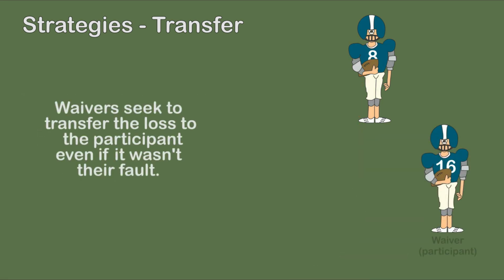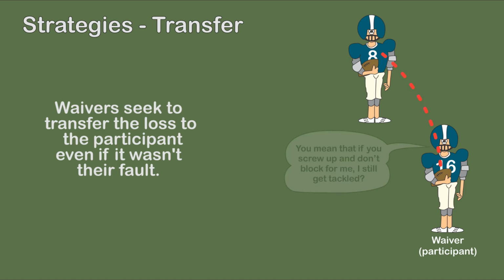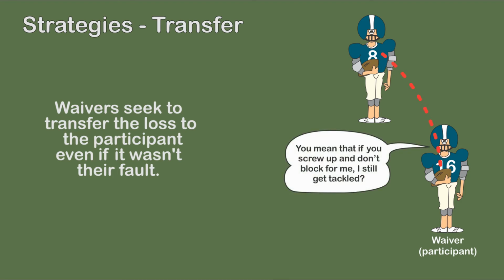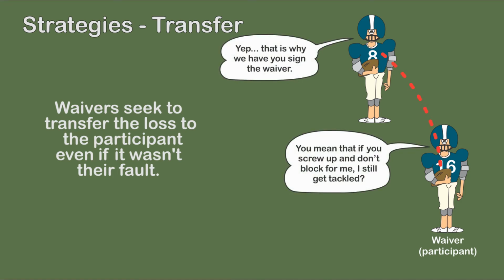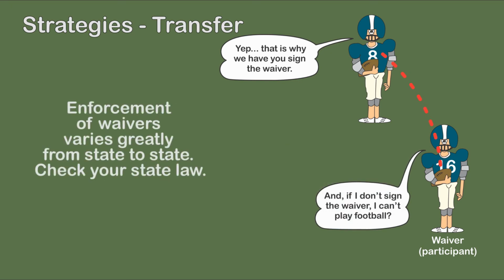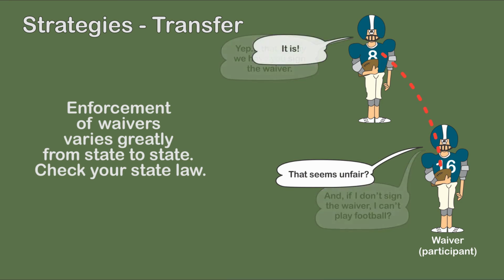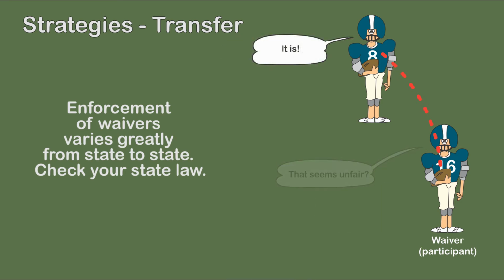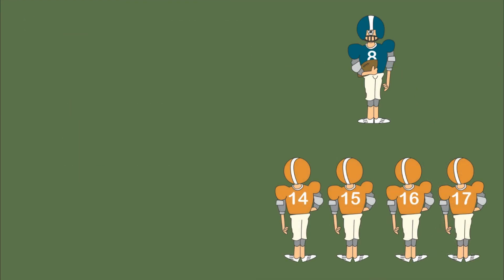Indemnification or hold harmless clauses, usually waivers, attempt to transfer the loss to the victim. Melanie signed a waiver. Enforcement of waivers varies greatly with state law. Often gross negligence is required to override a waiver, such as in Melanie's lawsuit.